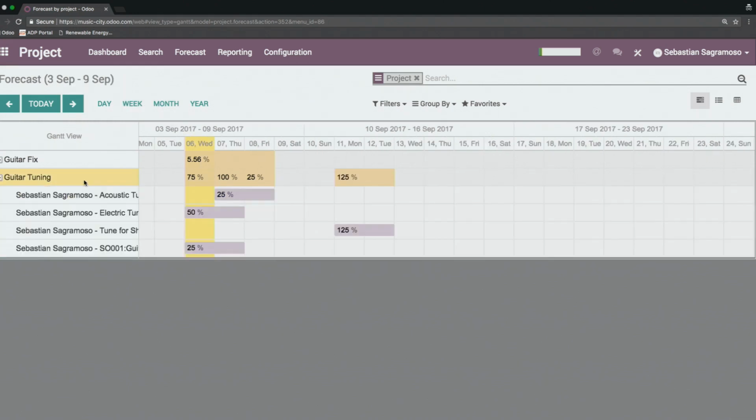So I've got a couple percentages up here, and I've got a couple different stages right here. These, of course, determine each task involved in the project and how much percent of my working hours this is going to take up. In this case, 25%, 50, 25. None are too large except over here where I can see I'm at 125. So this will be a red flag. I can now assign more people to work here.